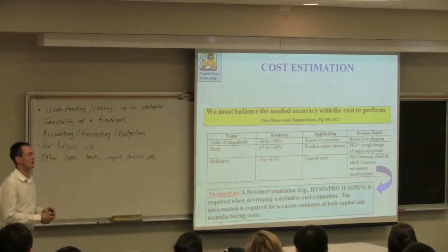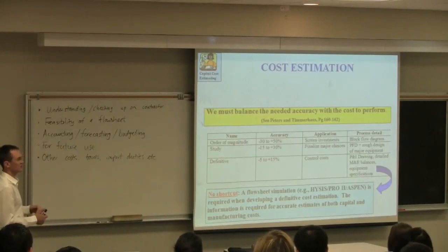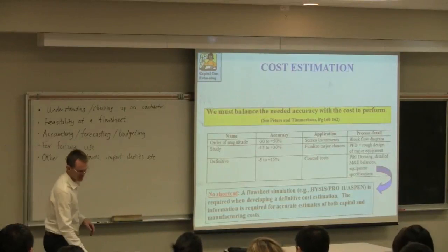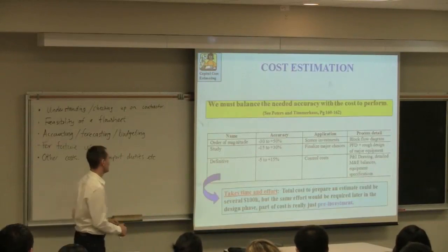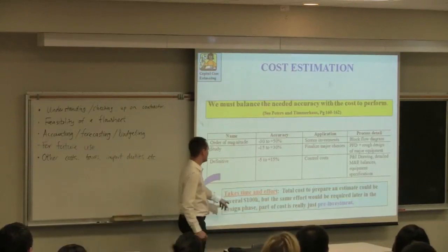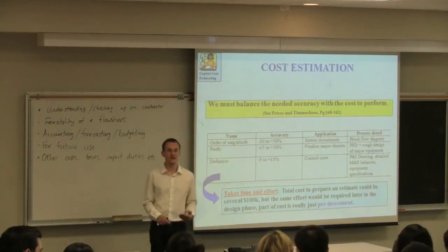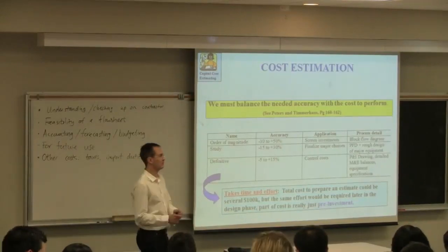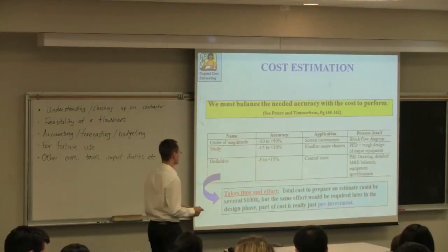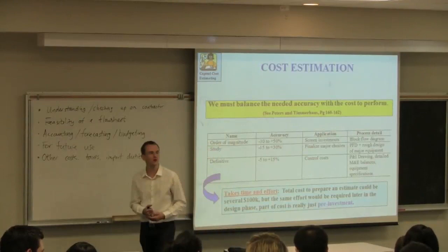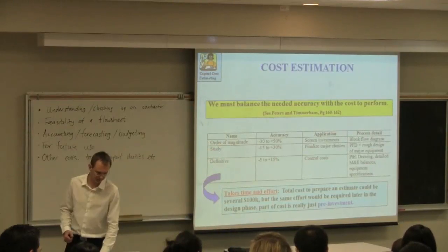So that's a substantial amount of money spent, even just the engineering time and hours to get to those capital cost estimates. Dr. Long here has a note that in many cases, just the engineers' time to develop those flow sheets and then to convert them over to dollar estimates can be several hundred thousand dollars. But that's usually rolled into the cost of the project as well.